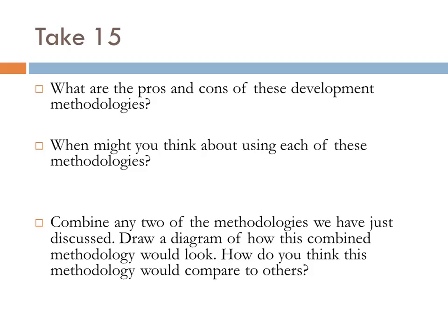part of the risk, and I think it's mentioned a little bit in the textbook as well, part of the risk with an organic approach like Agile is that, compared to at least the waterfall, some of the more structured approaches, less time is spent on highly in-depth planning and analysis. Getting some of the details down that are very important with these high reliability types of organizations or contexts can get missed out in an agile type of environment.